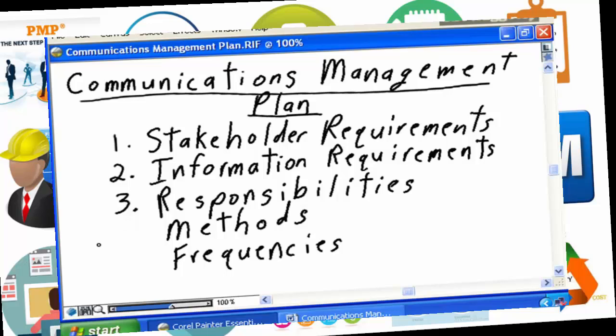Who is responsible for producing the weekly status report? When is the weekly status report due? It's going to identify the methods with which the communications is going to happen. Which communications will be formal through written documentation, which communications methods will be informal through meetings, through phone conversations, through email conversations, and it's going to identify the frequencies of communications.